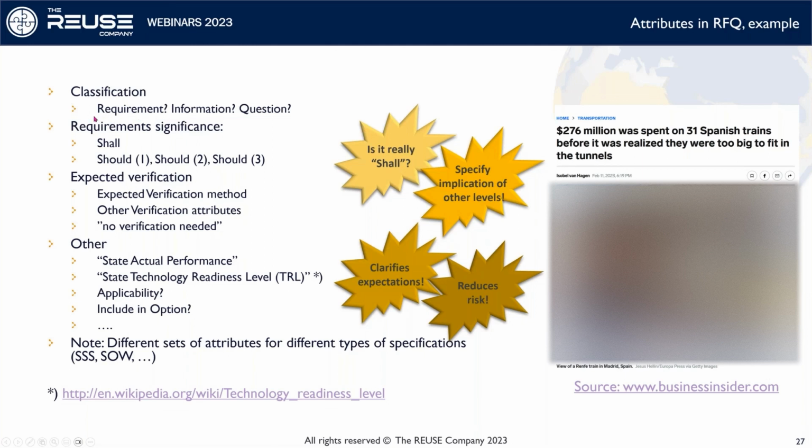However, when the bidders reply, they send it from their own company to you. They know who the receiver will be. So rather than saying the protection shall be this and that, you could ask, please clarify what sort of protection you have for your system. And then this could later on be evaluated in the evaluation and translated into a requirement in the negotiation. So there are a few ways to use this, and I think it could be really good if you use it the right way. Hope that answers the question.